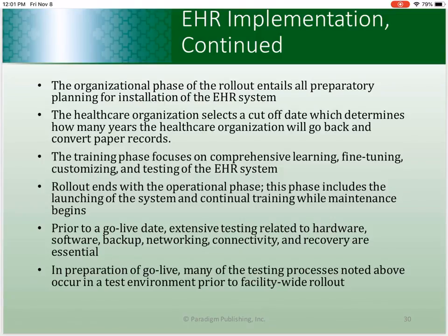This allows you to stagger so that you can resolve issues and get feedback from individual features. Then you can also do the Big Bang approach. You're going to use all of the EHR functionality immediately. All users use everything. This will speed up implementation, but it can cause risk of multiple problems or delays if there's something actually wrong with the system.